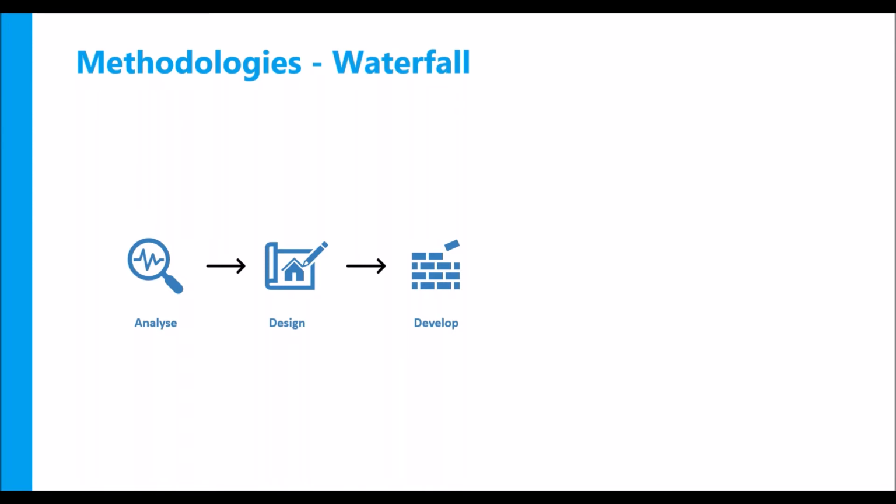Now, once I'm done with design, when I freeze my design, I start developing the code, right? And then here, I can't start the next phase or next process before I complete the previous process. And after I develop, I send it for testing. And after I am done with testing, I deliver. So this is all sequential, and it has its own pros and cons. We'll discuss that in a particular slide, as to what the pros are, what the difference clearly is between going sequentially and not going sequentially.